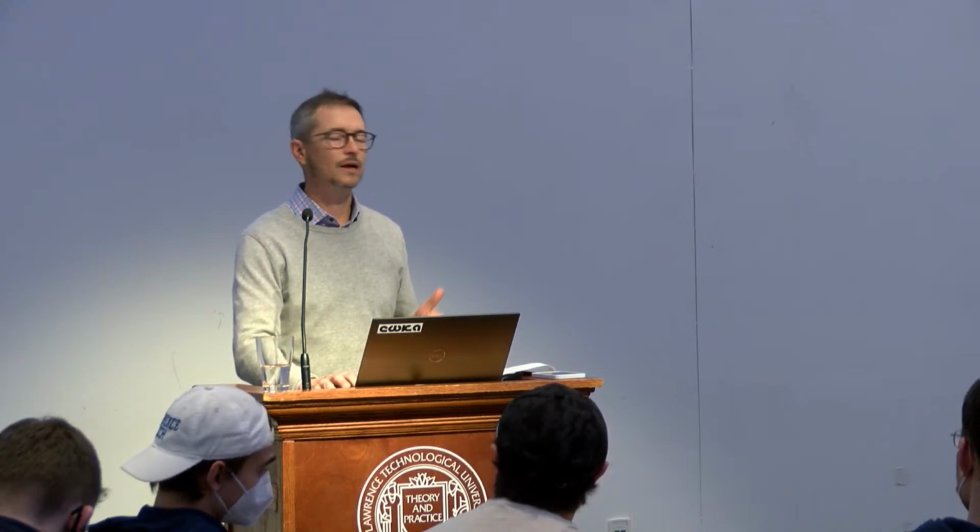Two things that I'll say to it, and this would have been one of my notes that I probably skipped over early on: tolerance. Doesn't matter how much time you spend laser scanning and how much time you spend laser projecting and how good your 3D model is, you have to know that you need tolerance. Humans, at the end of the day, frame this wall and it's probably 1/4 of an inch out of plumb, or this room is probably 2 inches narrower than it was designed to be. And that happens everywhere. And if you think that the built environment is going to be to the same level of tolerance as your model, you're in for an uncomfortable awakening.